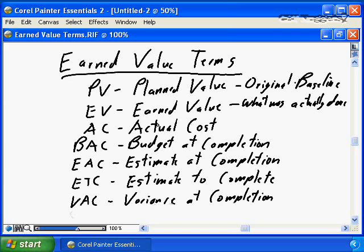The difference between earned value and the plan is maybe a different resource worked on the task. That resource cost $5 more an hour. The variation is what it was actually done had it been done according to plan. Or the task was originally scheduled to take 40 hours and it took 46 hours. It's the work that was actually done, but what it would cost had it been done at the 40-hour level rather than the 46. So there is an element there.